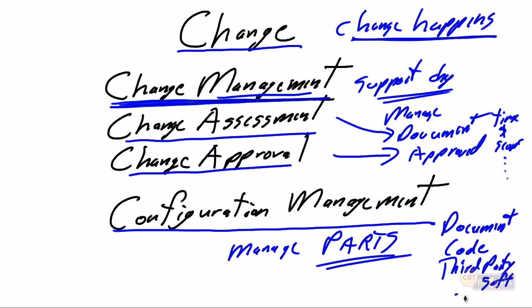we need to manage the versions of all of the above. The first time a document gets produced, it's probably going to be in draft mode, and we're going to have a 0.1 through 0.9 version. We present it to the business for acceptance. We're going to move our version to 1.0. We're going to get it formally accepted, and that version is going to be locked down.